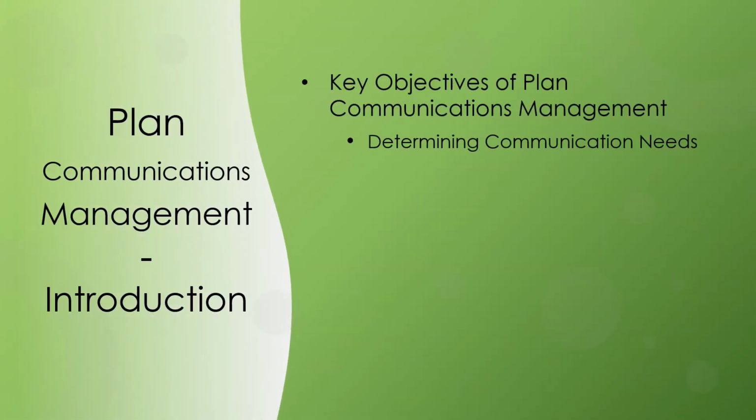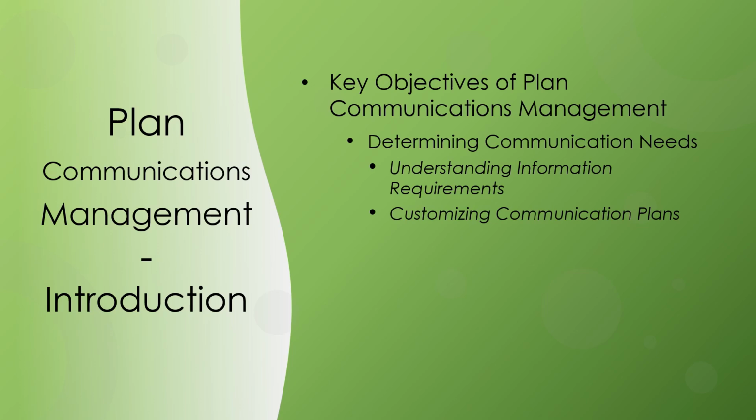Determining communication needs. To create an effective communication plan, it's crucial to grasp the specific information needs of different stakeholder groups. This includes identifying what type of information they require, the frequency of updates, and their preferred communication channels. Based on the information requirements, project managers develop customized communication plans for each stakeholder group. These plans lay out what information will be communicated, how it will be communicated, and when it will be communicated.